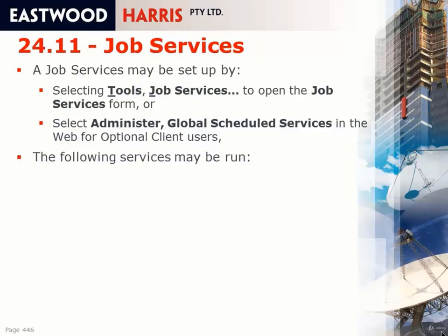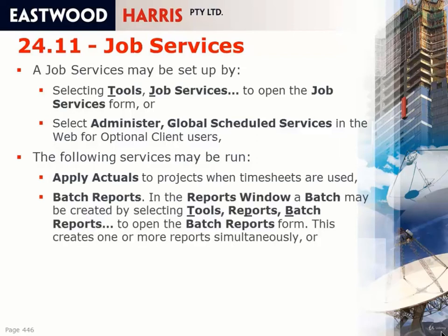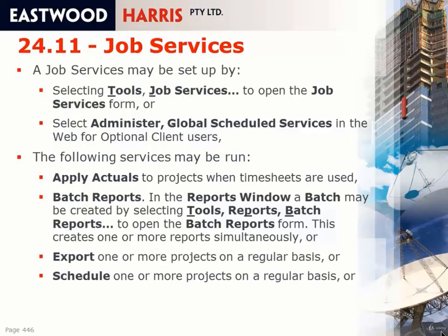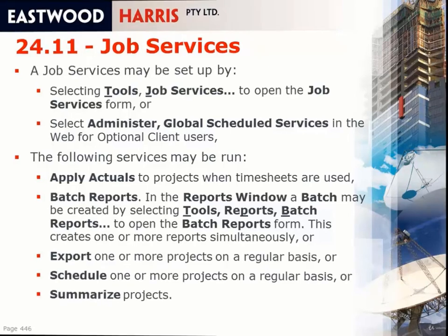So the following services may be run. You can apply actuals, which is used to bring in the actuals from the timesheeting. You're able to batch reports, which means you can print reports or produce reports automatically. You can export projects, schedule, or summarize projects. So let's have a look at job services.